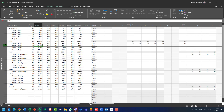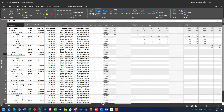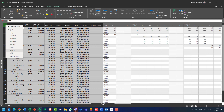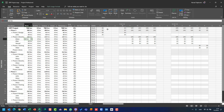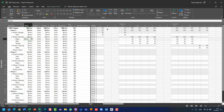If I go back to Task Usage view and switch to Work, I will see that for Phase 1 we need 280 hours, and for Phase 1 Development I need 168 hours. In this case I will see the total hours for the whole task — 56 hours from Mary, 56 hours from Alan, and 56 hours from Nanette.